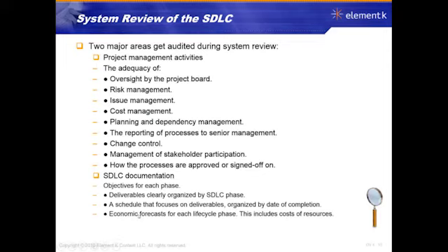In the SDLC documentation also, for each phase, I wanted to see the deliverables that were organized by SDLC phase. So I want to see documentation for the concept and initiation, the requirements, the design, the development, the testing, the deployment, the post-deployment. And we'll want to see the schedule that focuses on producing the deliverables organized by date, and also any economic forecasts for this life cycle phase, including the costs of everything involved with this. So these are all things that we're going to be looking at when we are auditing the SDLC.